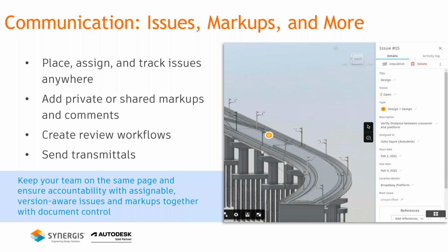Ultimately, we can get an audit trail for the review process. Somebody makes a drawing, somebody reviews it, somebody makes a markup and creates an issue out of it. The issue gets addressed. Maybe there's another revision, maybe there's another markup, so that process can repeat itself until the drawing is as intended.